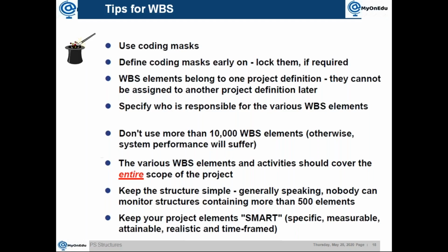So there is a constraint from the coding mask. For example, if you don't have that kind of complexity in your organization, then using the coding mask is always better. A WBS element belongs to one project definition, and it cannot be assigned to another project definition later. Obviously, that is true. You can specify who is responsible for the various WBS elements. Then they say don't use more than 10,000 WBS elements, otherwise system performance may suffer.